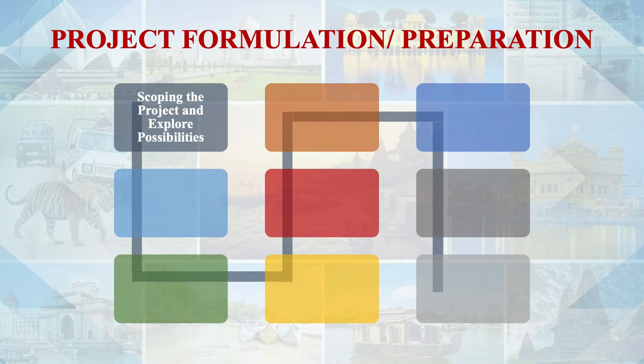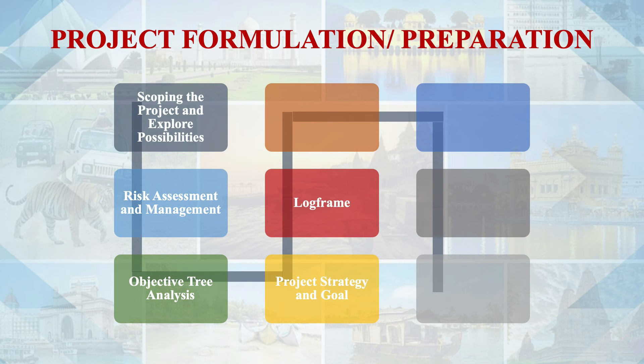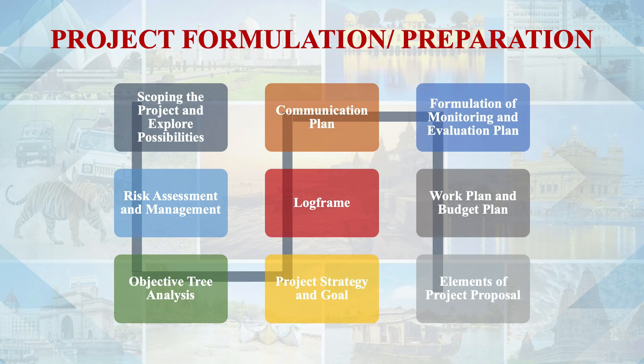Once we have an idea and it passes screening, we need to formulate a project report. A project report is prepared for project inception and submitted after completion. Key elements include scoping the project, risk assessment and management, objective tree analysis, project strategy and goals, communication plan, monitoring and evaluation plan, work plan, budget plan, and elements of the project proposal.